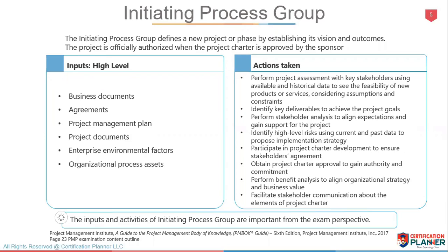Now, one thing I want to point out is that a lot of these are living documents. So your business documents, your project management plan, some of your project documents, which we'll later talk about, like the risk mitigation plan, and stuff of that nature. What I mean by living documents is you're going to constantly update them through the project. As the project develops and as you execute, these documents need to be updated. They're very dynamic in their content, and rightly so. You should continue to update them as you gain new information, as events happen throughout the process. But you need to understand these for the exam.